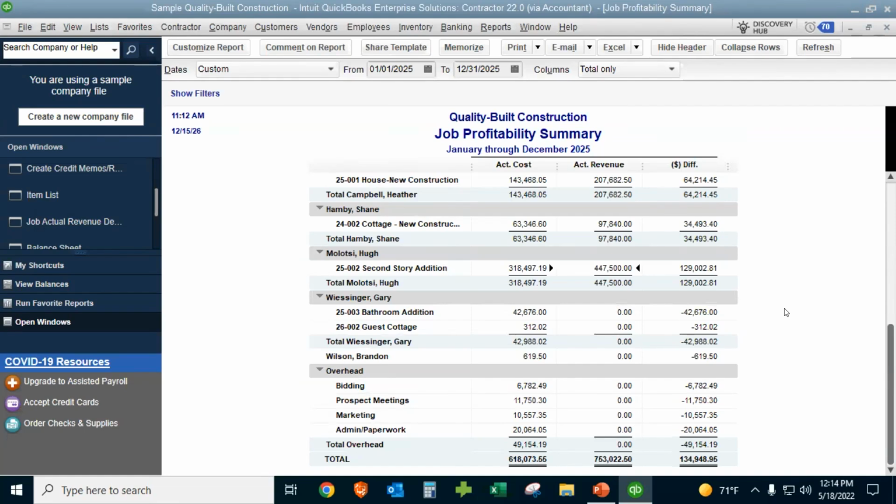Yeah, and we might even coach you to say, hey, it isn't really bad debt, it's a reduction of revenue, so that those do in fact tie and make the close process easier. Right. In this situation, I would probably take that bad debt item and have it go to construction income instead. That way it's properly reflected on the P&L to match the job profitability summary.